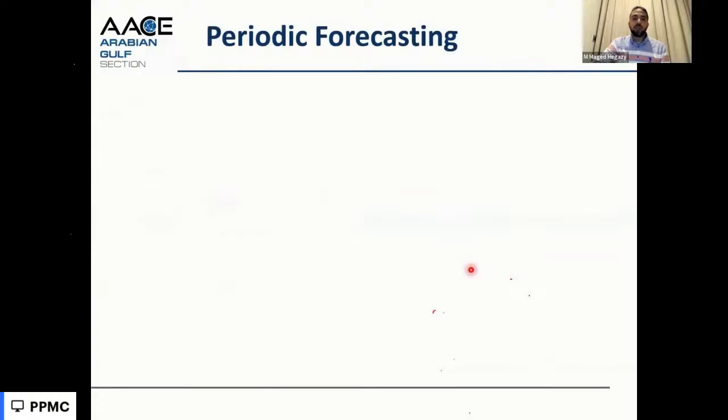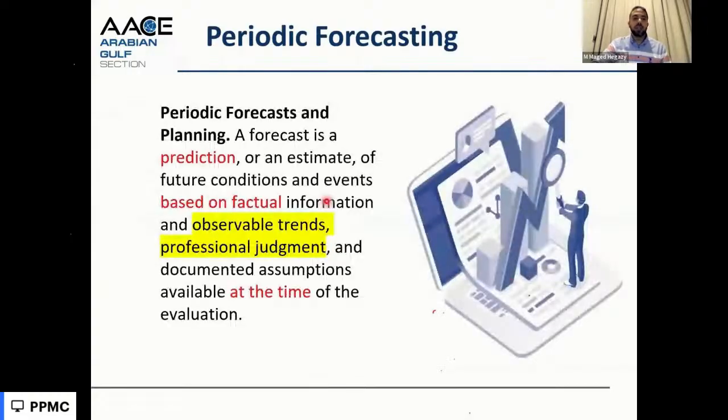From time to time, as we are updating, we get the forecasting and the remaining duration and the new completion date. It's not only the schedule that calculates this; we also need to do observational trend checks of the productivity of the activities. As we said in the beginning, the productivity of the activities and actual productivity affect the critical path.